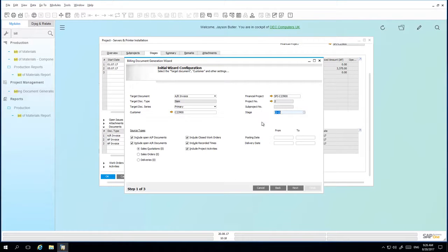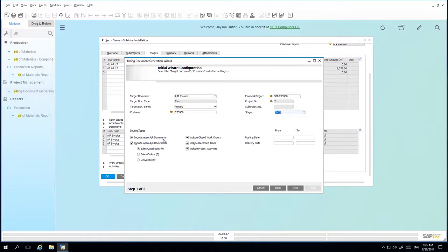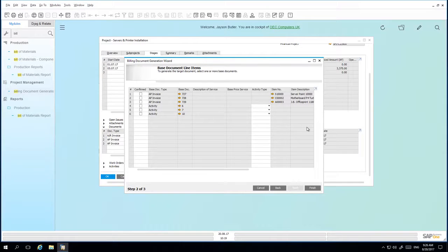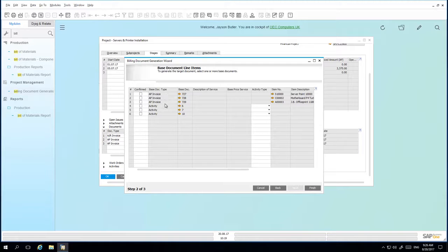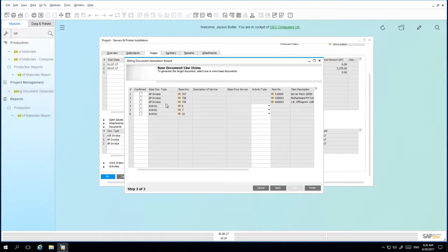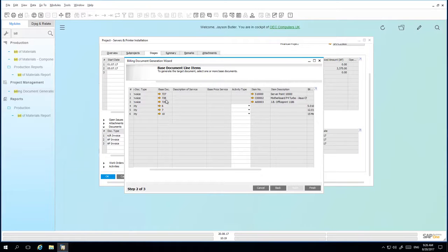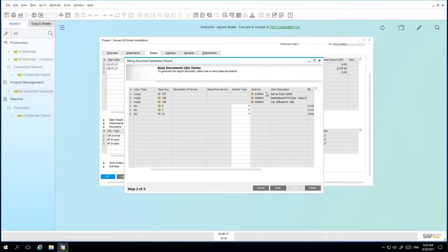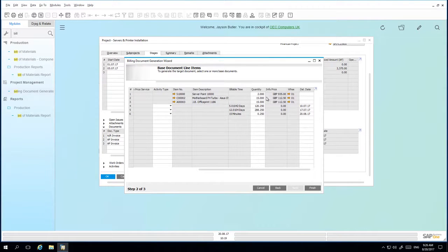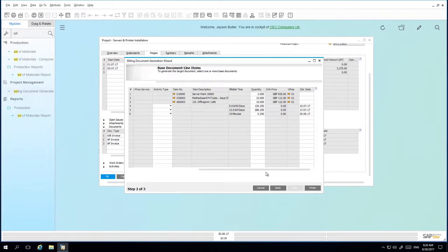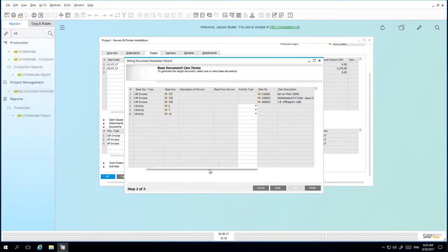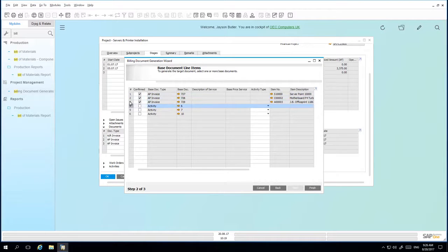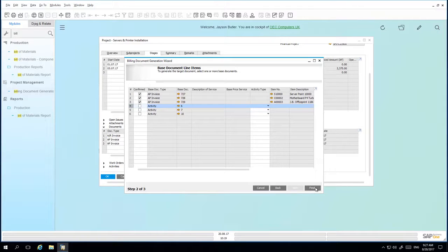You then select the source type, so in this case we want to include all open AP documents. You can also include any AR documents, work orders, recorded times or even project activities. From here, we can see that there are a number of AP invoices that have been created on behalf of this project for this customer. We can also see the base document of those invoices, the item details, the item descriptions, quantities and the info price. Especially, for example, around activities and billable time around those activities. In this case, we're going to select all of the AP invoices for billing and we're going to click on finish.